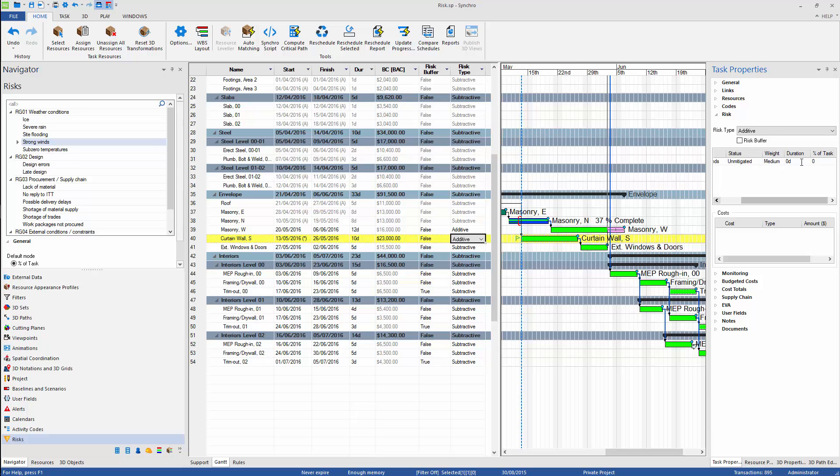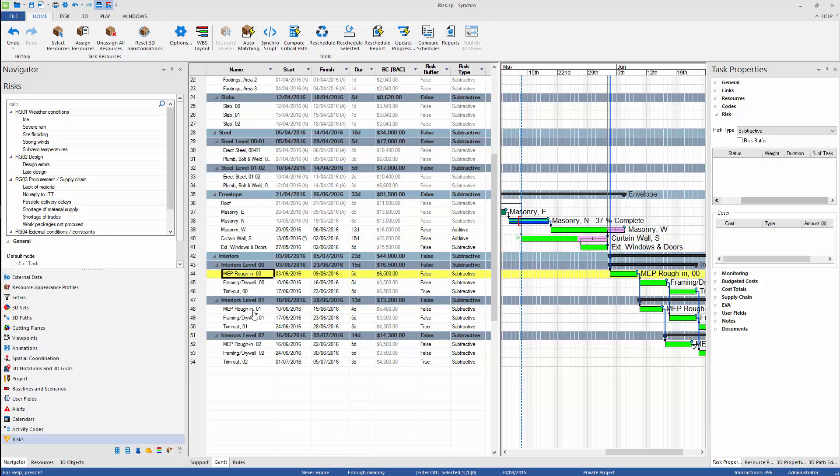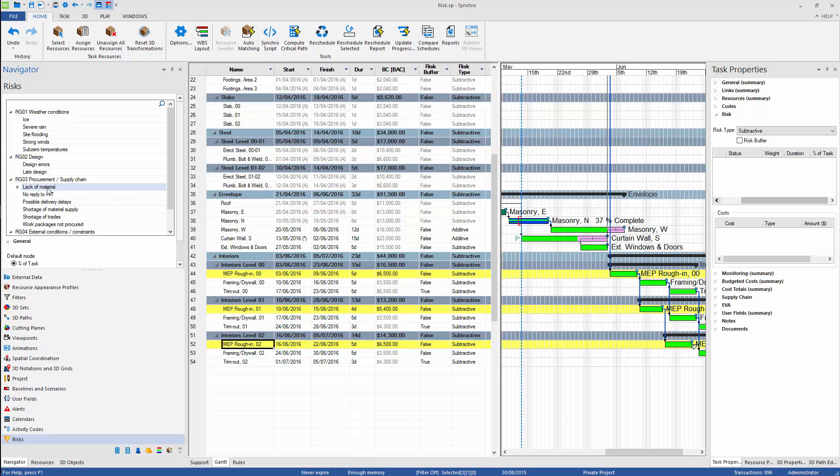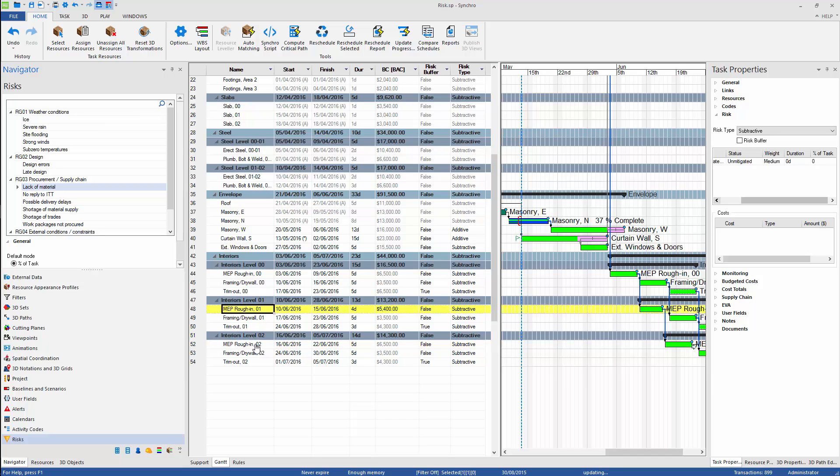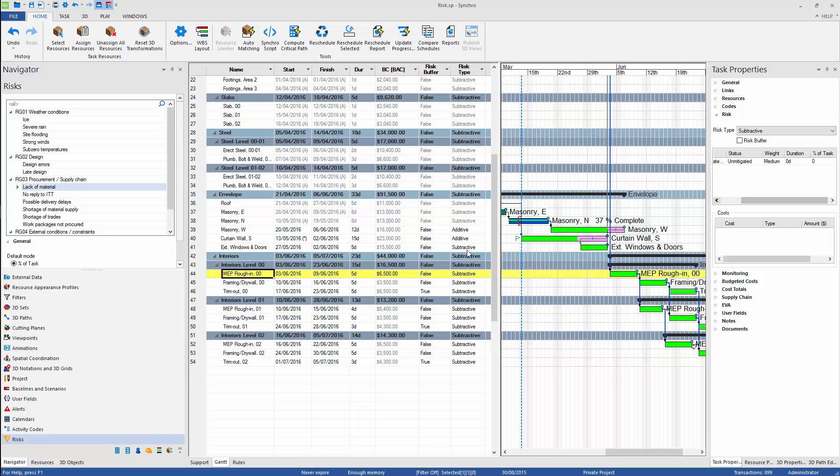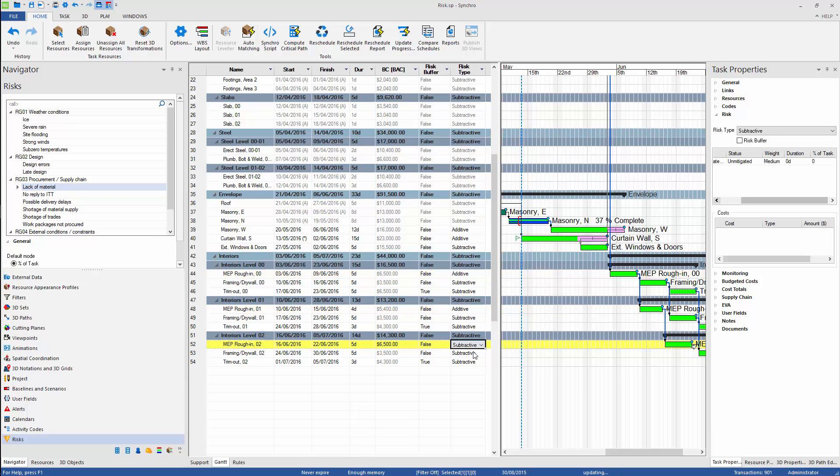When the risk is added, the taskbar in a Gantt chart view is changing. Plus sign indicates additive risk, and minus sign indicates subtractive risk. Additive risk will simply increase the duration of task, and a subtractive risk will always be included in the original duration of task.